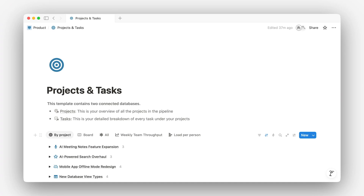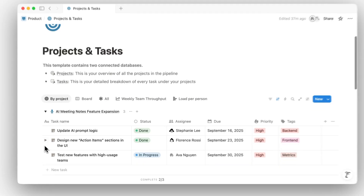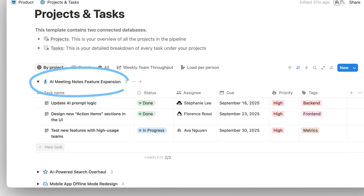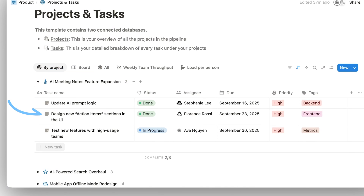Once you've added the template to the team space, everyone in that space will have access to this database. Now that you've got the database set up, here's how projects and tasks work together. Projects are the parent of tasks — one project can have many tasks, but each task should only be linked to a single project.